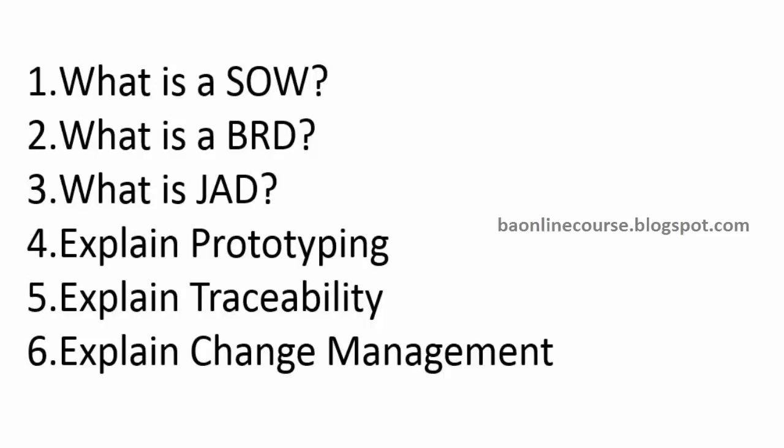So right from the SOW, we ensure that it's converted into a requirement. That requirement is converted into a design document. That design document is converted into an actual program, and finally, it's tested out. If you do this for each and every requirement, we can be pretty much sure that if you have committed to some 100 requirements, all 100 requirements are finally translated into your final working system. So this process of tracking the requirements right from the start of the project till the end, to make sure that we are delivering all of them and also linking them, is called traceability.